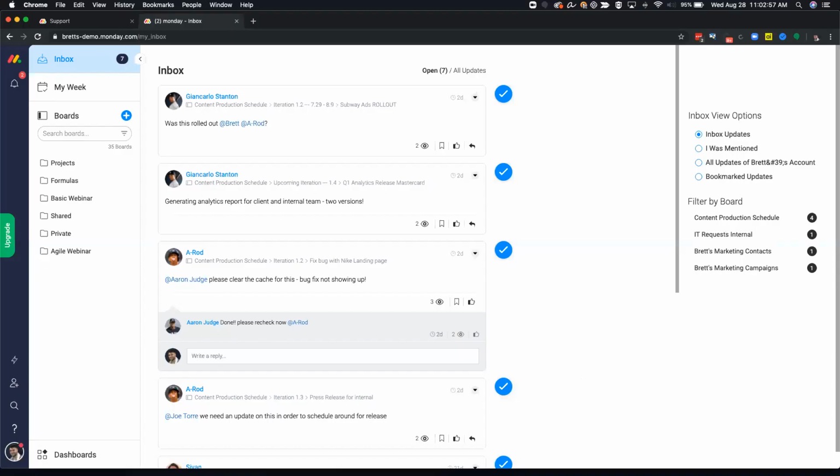So as I mentioned, we're going to be touching on the basics of Agile first. So for those of you who may not know, Agile is a methodology of project management. It was originally created and used by software developers, and it has since spread into more industries and businesses, and now is one of the most popular methods of managing projects. Agile plans via the use of sprints or iterations, which are short repeating periods of about 1 to 3 weeks in which a team focuses on a small set of work items and aims to complete them all during this period.